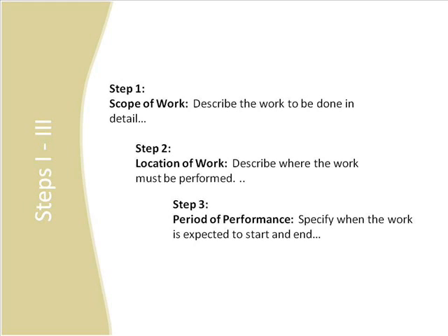Step 1. Scope of work. This describes the work to be done in detail. Specify the hardware and software involved and the exact nature of the work. Step 2. Location of work. Describe where the work must be performed. Specify the location of hardware and software and where the people must perform the work.